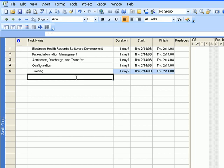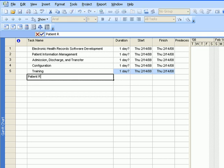So let's continue and let's put in the next task, which is patient registration. Like the first task that you entered earlier, this one also has two parts. It has the configuration and training parts as well. So let's go ahead and enter configuration and training.